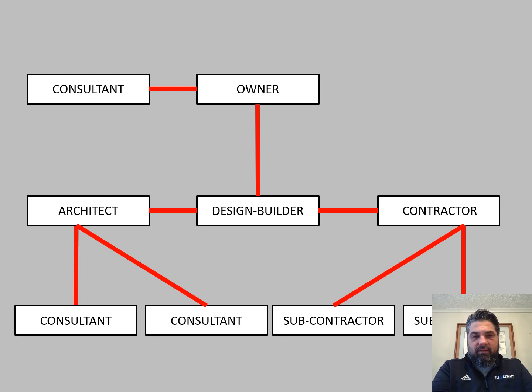And so that's the method that they chose to do, where they hired this bridging architect, which basically takes the design and the drawings up through, say, maybe 50% design development, maybe full design development level. And then they hand that information over to the design build team. The design build team then executes the final contract documents for the project and constructs it.